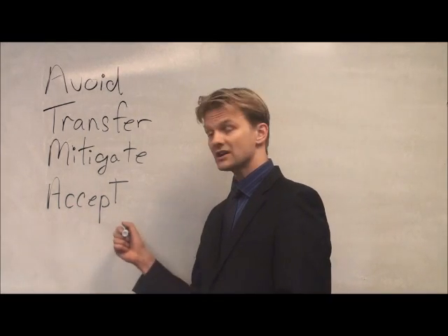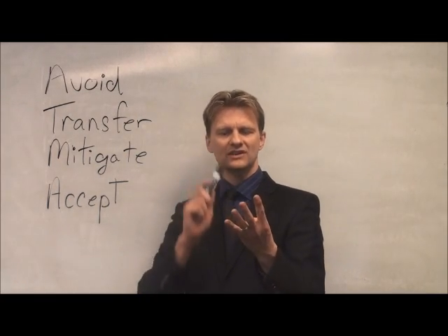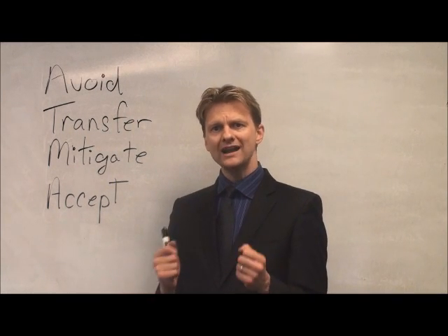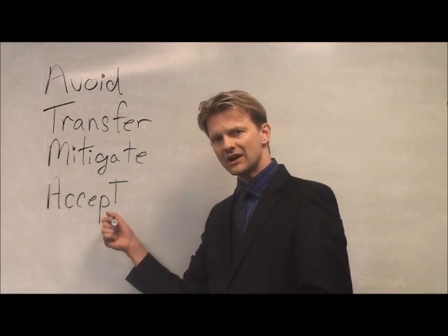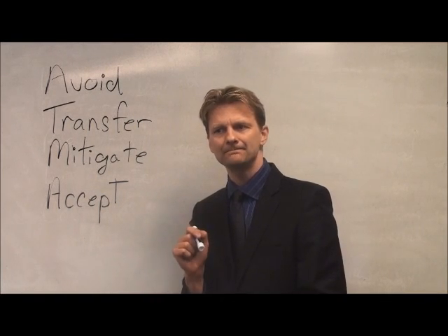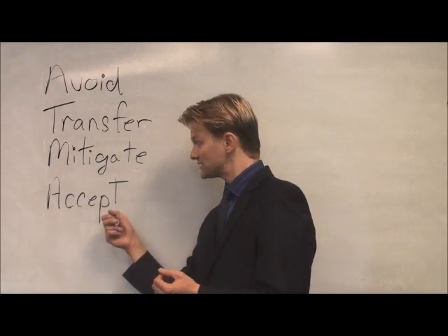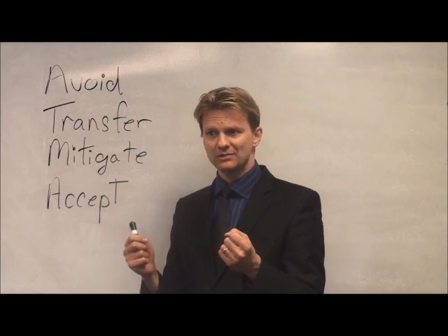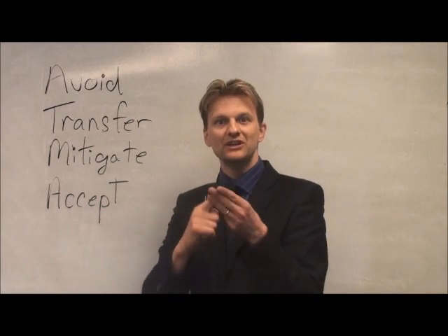And that is very common because we are always constrained with money, time, resources, equipment. So with all those constraints, we're accepting a ton of risk. So ideally what you do is you document all those acceptance risks, and for the big ones that have maybe a high probability and impact, you want to create a contingency plan. The contingency plan is the backup plan as to if this risk event occurs, then what? So the simplest contingency plan is to say, these 3 people will meet and figure out what should we do.